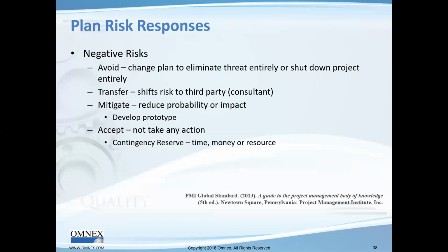There are some risks that we can learn to live with. That's the reason why we do a risk priority number. We want to do the ones that have high risk. By the way, any risks that we come up with that are safety-related or regulation-related, we should take a look at that and find out, is there any way we can reduce the risk even more, regardless of what it is? So even if it may be considered acceptable because it's safety related or regulatory related, we should at least consider, is there some way we can make it even better?